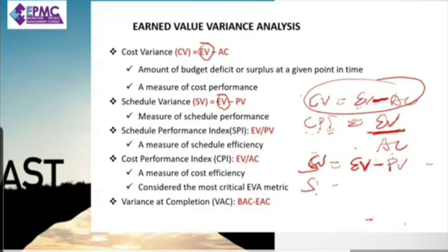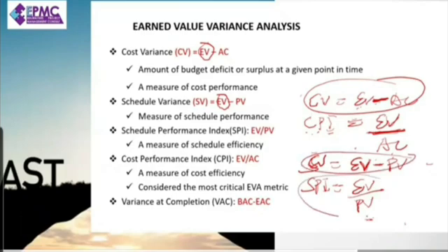So if you want to turn this into an index, a ratio, EV over PV. Great. EV over PV, that's it.